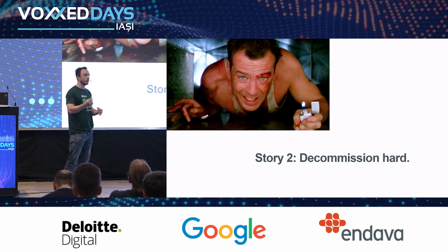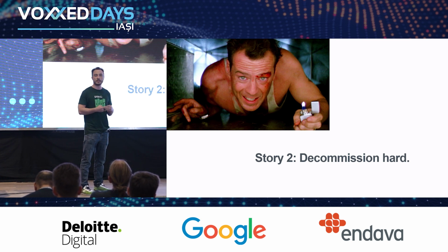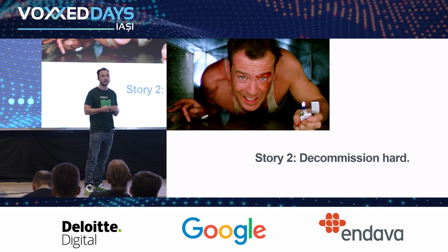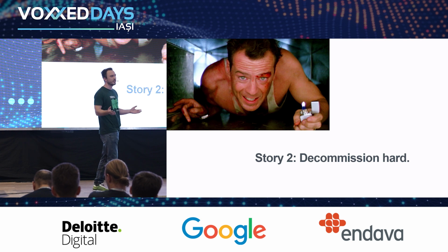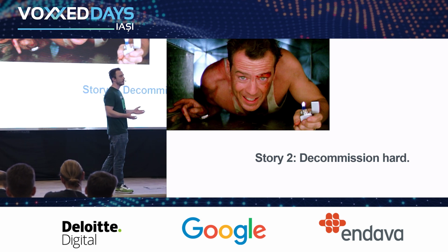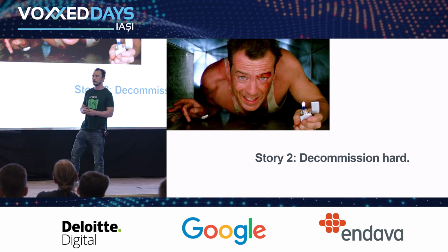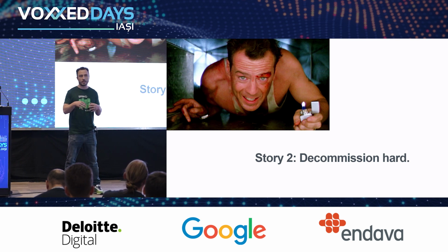And with a very important thing: at the end, my stakeholders had to understand that once we release the first version, they have to immediately give me time to pay back all the debt, or at least the most important part of it. You can honestly never pay back all the debt. But there is an important part of it which you know is the part that will affect you the most, and if you don't pay it in time, you will end up with that kind of software that will have to be rewritten.